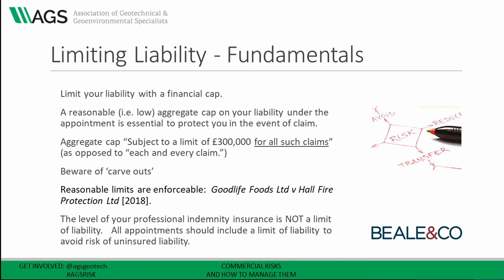Even more worrying is that some people believe that, provided the contract refers to the limit of their professional indemnity cover, they are not exposed to liability greater than that figure. This too is incorrect. A fundamental point to remember is that the level of your professional indemnity insurance is not a limit of liability, either by implication or otherwise. If you've undertaken to maintain cover of two million, your client could nevertheless sue you and you could be held liable for a much greater sum — only two million would be insured, the rest would fall to your company. So all appointments should include an express limit of liability, separate from the statement about the level of insurance you've been maintaining.